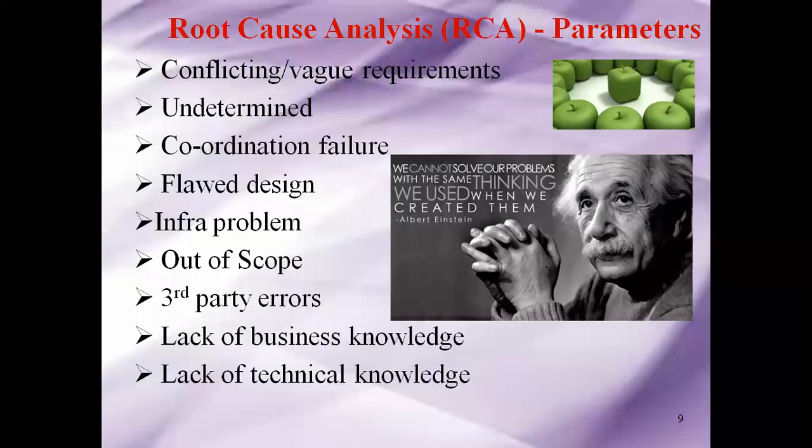That is the standard rule of software project management life cycle for scope. So out of scope is like this. Suppose above the critical mass line, some features are going to creep in, and we don't do it because we still feel that it is very difficult and the requirements are vague, what happens is we put them in the out of scope bucket, one way.